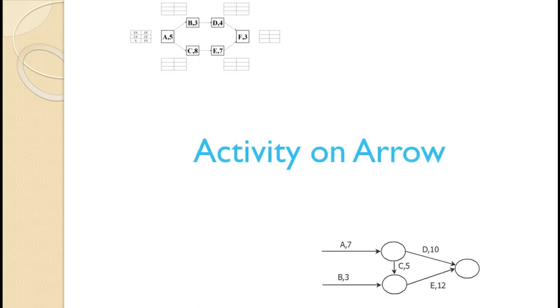The chart you see at the bottom is for a different project. This notation is called Activity on Arrow, or AOA. The arrows represent both the activities and the precedences, and the nodes have no meaning beyond being intersection points. This is an older format, has fallen out of favor, and will not be mentioned again in these tutorials. In addition to software using AON format, AOA format is much more complicated for complex projects and often requires a large number of dummy activities.